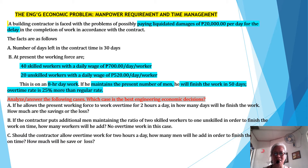Case 2: In order to finish the work on time, how many workers will he add? There is no overtime work in this case. Case 3: Should the contractor allow overtime work for 2 hours a day, how many men will he add in order to finish the work on time? How many will he save or lose? Which case is the best engineering economic decision?